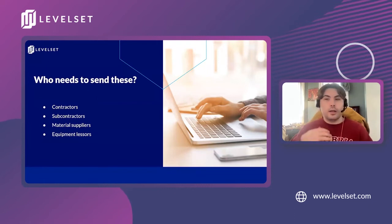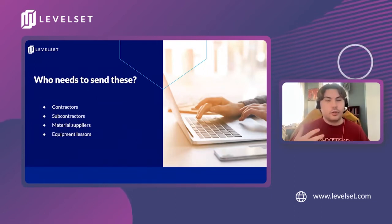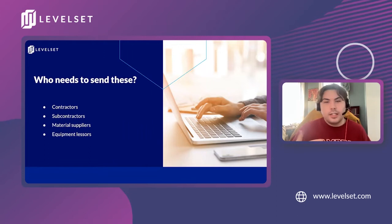And so a really important question here is, who needs to send this document? And so the short answer is basically everyone: contractors, subcontractors, material suppliers, and vendors. Additionally, general contractors on private projects that involve a lender will also need to send this, but a good rule of thumb is to send a prelim as a proactive tool. There are two specific parties, though, who are exempt from California's notice requirements.